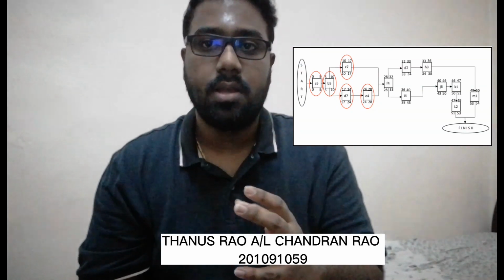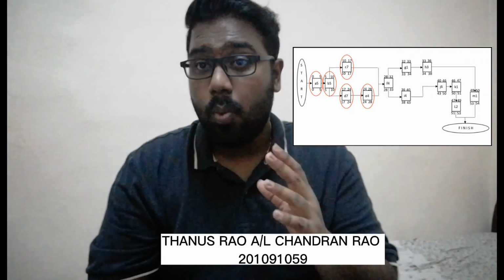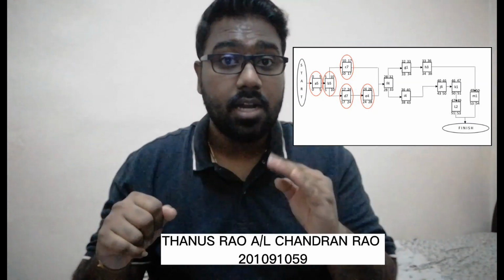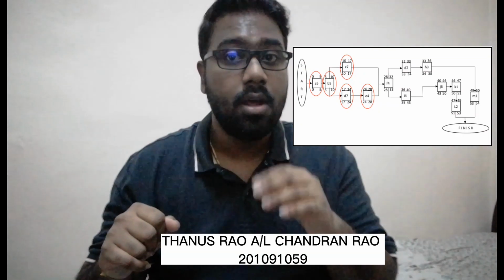Project duration is determined by a series of interdependent tasks known as a critical path. The critical path tasks must be completed in a specific order for the project to be completed. When a task is on the critical path, its float value is 0, indicating that there is no delay allowed in the order of execution. These activities must be completed in the allotted time. If one is delayed, the entire project will be as well. In a nutshell, the project must be finished in no less than 15 days.